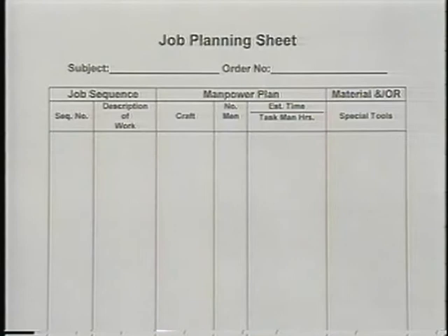Now, let's take a look at those four basic time elements. I have preparation time, which is the first operation. Then I'll have the estimate for that, the estimated time. The second is travel to the job site. I'm going to have that time element. The third are the different sequences or steps when I actually perform the PM activity. We're going to have individual times for that, but we want to summarize that third major step. Then we're going to have the fourth step, which is travel from the job site. It will have its time element, and the summary that I'm speaking of is merely to summarize those four total time elements by the four major activities. Now, the column on the right-hand side addresses the material required, the special tools, the equipment, and the documentation.